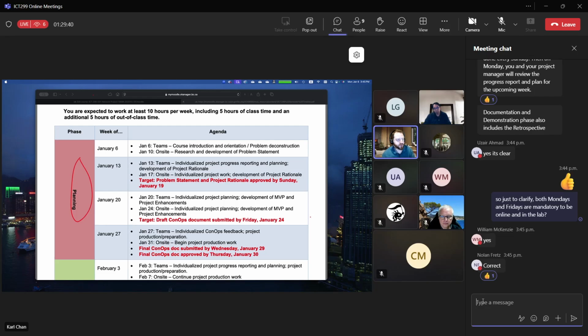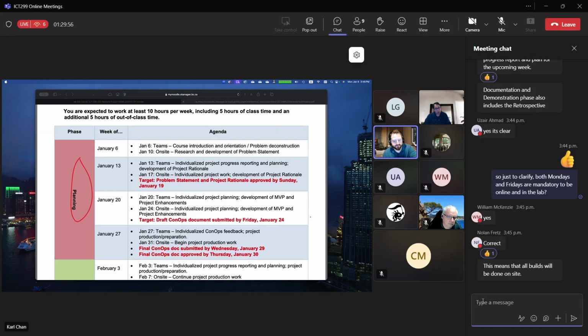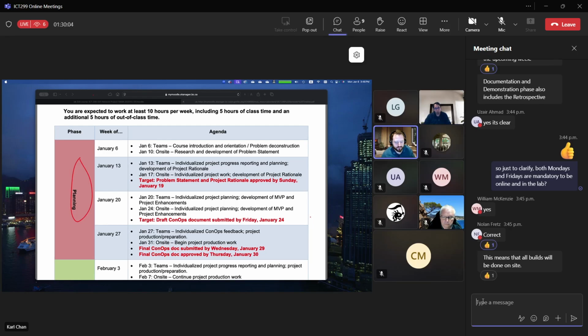Because let's say they only put 20 hours into that planning phase, really they're 20 hours behind. And then all of a sudden your execution phase becomes 80 hours because you're trying to make up that time. And this course is not gracious enough for you to fall too far behind. It's really not. So we want to try and, as project managers, prevent that from happening to you. Yes, through the planning phase. That's true. We really do not want you to experience that.